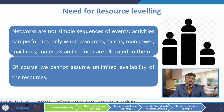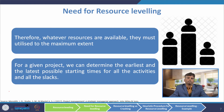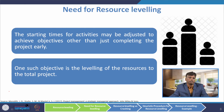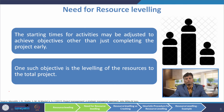The need for resource leveling: networks are not simple sequences of events. Activities can be performed only when resources — that is manpower, machines, materials and so forth — are allocated to them. We cannot assume unlimited availability of resources; therefore, whatever resources are available must be utilized to the maximum extent. For a given project, we can determine the earliest and latest possible starting times for all activities and all the slacks. The starting time for activities may be adjusted to achieve objectives other than just completing the project early. One such objective is the leveling of resources across the total project, because we have slack for certain activities, so the earliest starting time can be adjusted to match demand and supply of resources.